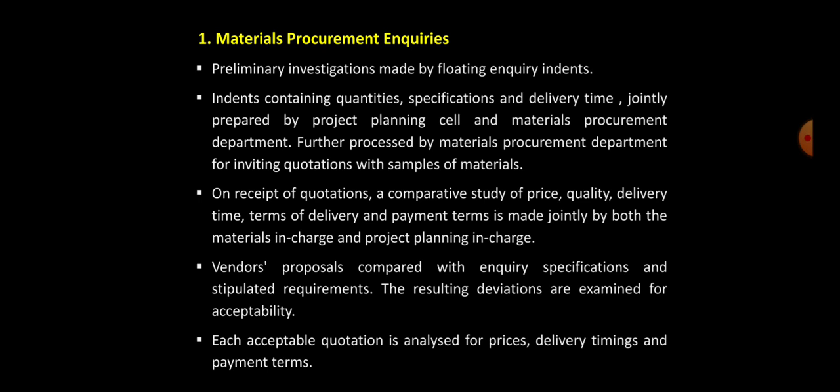After receiving quotations, a comparative study of price, quality, delivery time, terms of delivery and payment terms is made jointly by the material in-charge and project planning in-charge. Other activities like comparing vendors' proposals with inquiry specifications and requirements are also carried out simultaneously.